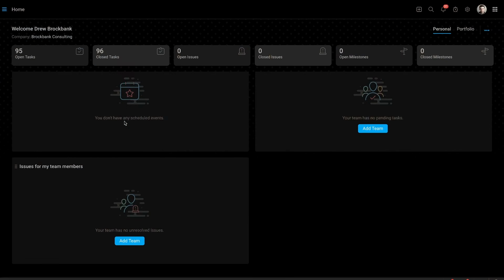Within milestones, you have task lists, which are just a way to group the various action items. An action item is a task. It's a way to group the various action items that you have in the project. And then within a task, you can have various subtasks. That's really how far down the rabbit hole goes. The hierarchy is project groups, projects, milestones, task lists, tasks, and subtasks. That makes up the hierarchy of Zoho Projects.